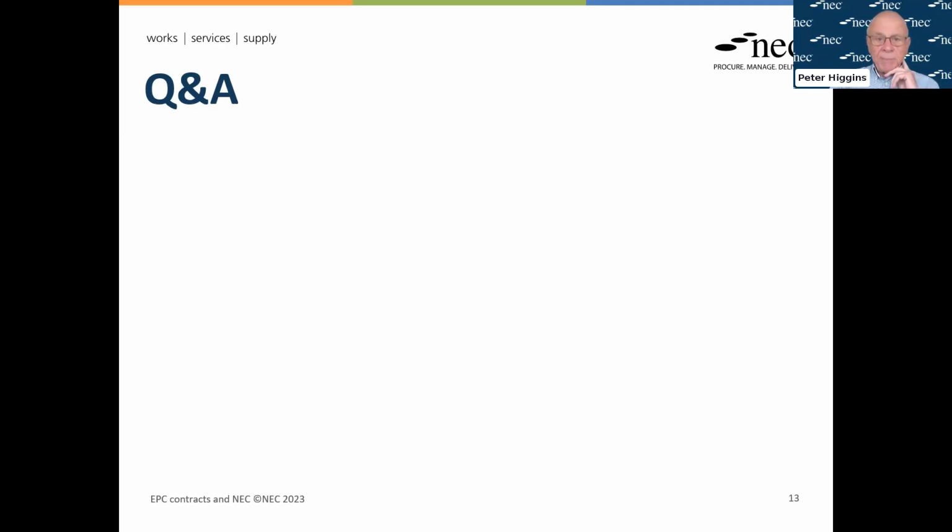Question here, Shai, you mentioned the benefits of EPCM. What are the disadvantages? I think you touched on some of those. We touched on it to an extent. Yes, the benefit of a turnkey concept is, as Peter said, you just turn on once it's ready and you should be able to press a button and it all starts working. There's less involvement and you're relying completely and passing all the risk to the contractor. EPCM is the opposite, in the sense that the client very much needs to stay involved in the project. Obviously, there's a large degree of reliance on the construction manager, but you can't have the hands-off approach that you would with EPC.